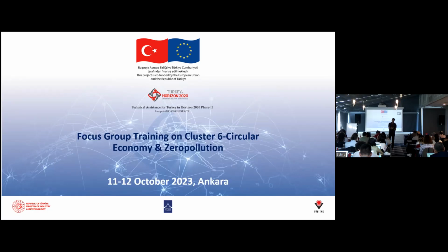I'm an expert also on behalf of the European Commission. So sometimes the European Commission engages me to evaluate some proposals. One of the things that we look at in the implementation is the milestones and the risks. And in most cases, if a proposal hasn't been funded, one of the comments that they receive is on the risk table. The risk is very generic, or the risk hasn't been addressed adequately, or they are not aligned with the project ambition. This is what they say. It's copy and paste. You don't want to receive that kind of comment. That's why you ask the work package leaders to give you an exhaustive list, as many as possible, as 3, 4 risks that they can see for their own work package.